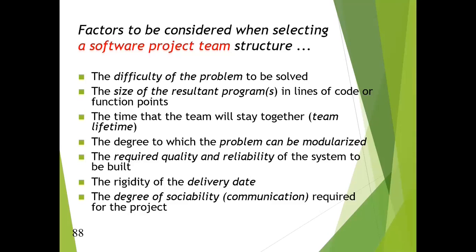The difficulty of the problem to be solved, the size of the resultant program in lines of code or function points, the time that the team will stay together, the degree to which the problem can be modularized, the required quality and reliability of the system to be built, the rigidity of the delivery date, and the degree of sociability, or we can call it communication, required for the project.